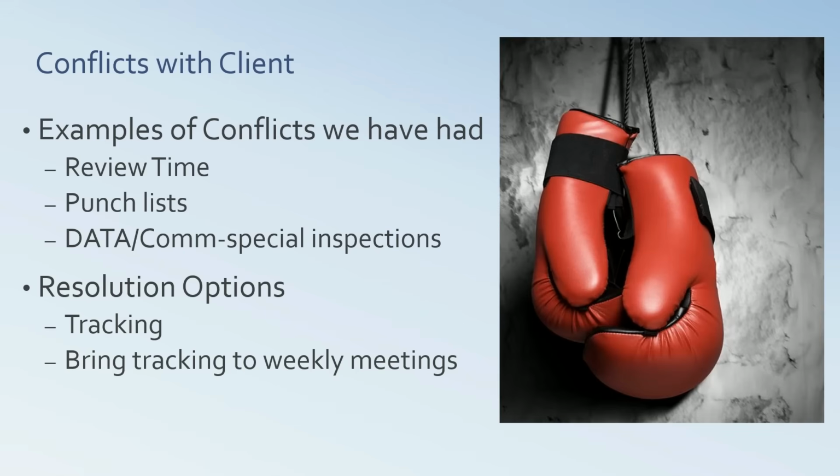Tracking takes care of your punch list. Tracking takes care of review times. And then bringing those tracking mechanisms to weekly meetings, right? So when you've got weekly meetings with your client, bring the RFI log, bring the submittal log. Say, yeah, we've got 4 RFIs that you guys are reviewing for us, and it could potentially impact schedule and time for this and this and this.